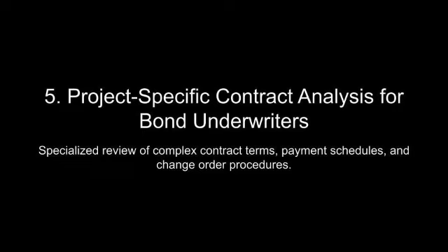For instance, an indemnity clause that shifts liability for intentional acts or gross negligence to the indemnitor may not be covered by standard insurance policies, leaving the contractor exposed to significant financial risk. Surety underwriters must assess whether the contractor's insurance coverage adequately supports their indemnity obligations, ensuring that there are no coverage gaps that could undermine the contractor's financial stability or increase bond exposure.